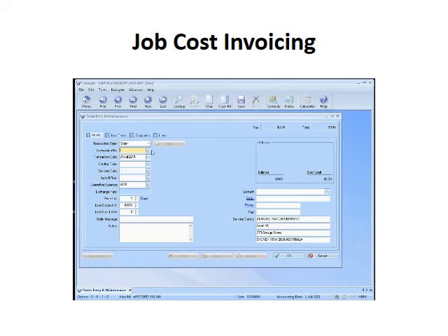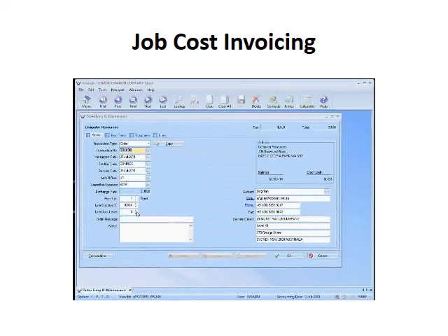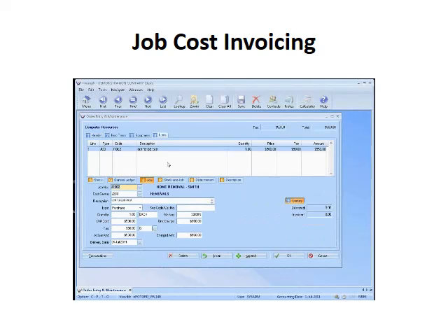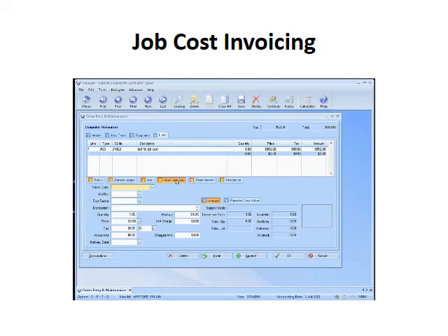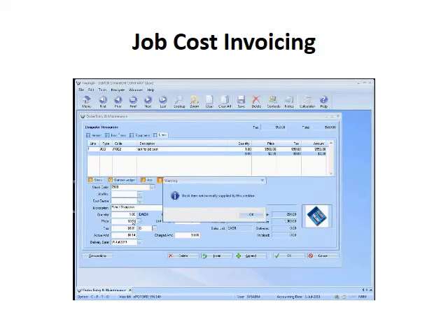What I also want to briefly look at when you're looking at a purchase order is that not only when you're doing jobs, you also have another line type called a stock job. What a stock job line purchase order lets you do is order things in your stockpile which you normally hold in stock for a particular job.